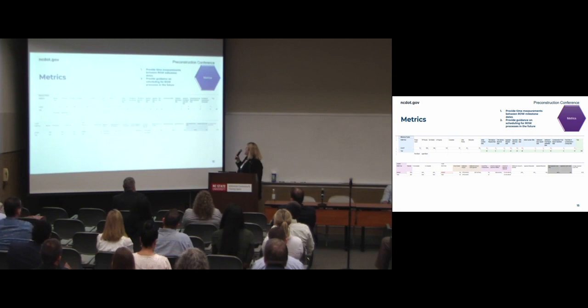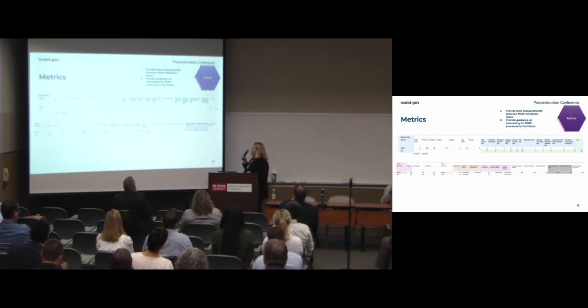And like I said, we know right now with our metrics appraisals, we're less than 90 days. We're 82 days out, so we're less than 3 months for appraisal, which is better than most states. I want to tell you that, okay? I talked with Tennessee a couple weeks ago, and they're having appraisals coming at 5 months. So at any point, it's nice to be able to calculate what that is. At any point, we can look at it and say, well, this is the problem, or there's a different problem somewhere else.